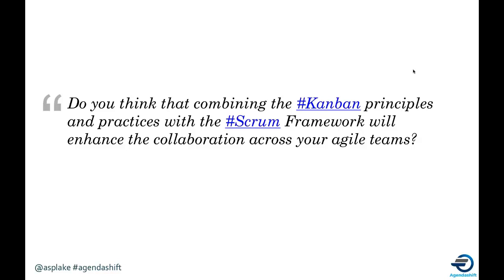And it's the sort of thing that just varies from team to team, and it depends on how complicated the design of your board is already. A lot of people like the idea of a swim lane for fast work, the expedite lane as it's often called, and that's an idea popularised by the Get Kanban simulation game. But it's by no means the only way of doing it, and just different colours can be appropriate as well.